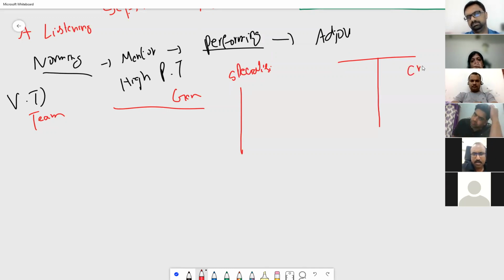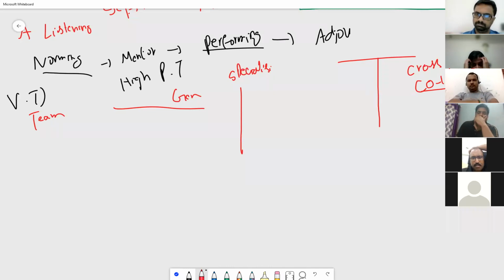So we want to have a cross-functional team having ideas of multiple topics, having information of multiple things, and how those things can work. And we try to have a co-located team. It is always preferred that we have a co-located team working at 10 meters or 33 feet, so that we can have osmotic communication, where people can overhear it.